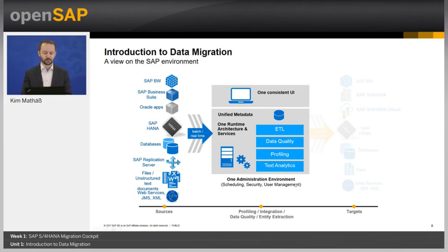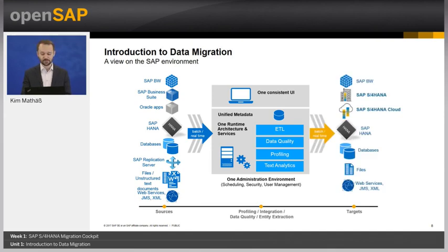And of course, anything around analytics. You always want to know how long the migration run took, for example, for a certain object. For your cutover planning, it took us an hour to load 500,000 business partners, for example. This is something you would like to measure, and of course have automatically created by the tool, so that you don't have to sit there with your stopwatch. And then on the target environment, of course, you can load it into various target environments.